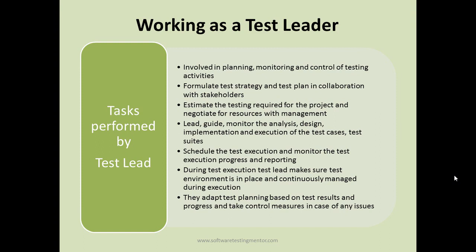Then he formulates the test strategy and plan, how the test execution for a specific phase will happen, what the plan will be, what the time frames are, and what the hardware and software requirements are. All these things need to be planned and finalized by the test leader. Then he estimates the testing required for the project and negotiates the resources for that project with management as well. So, what amount of testing is required for the project, and then negotiating the resources with management.